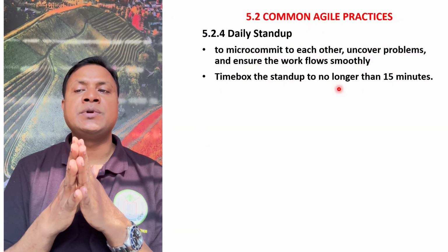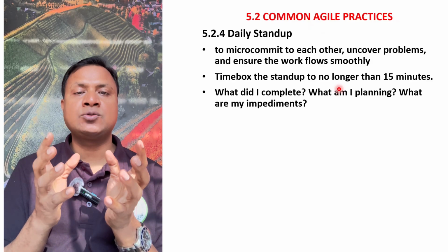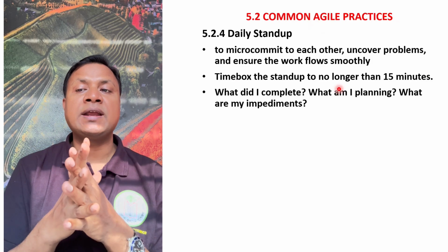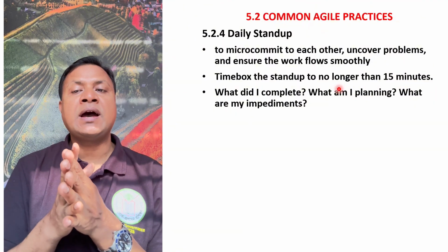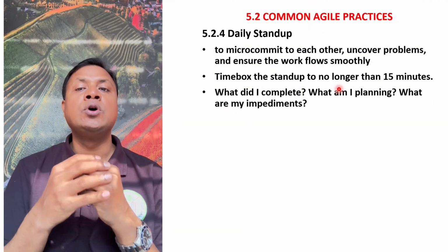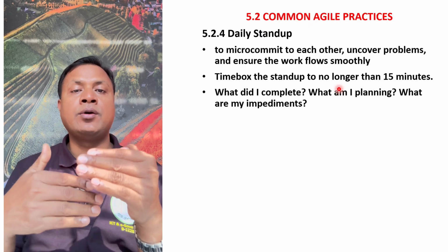Normally, a stand-up meeting is only for 15 minutes. Here we can ask questions like, what did I complete already? What am I planning? What are my impediments? These sorts of questions help you to understand the present situation, whether you are ahead or behind.